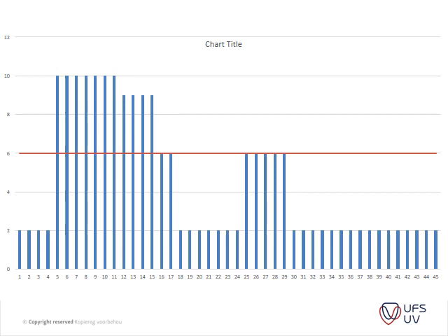Okay, now the example continues to indicate the maximum amount. So the problem is that the contractor only has 6 joiners available to work on this project. If the project completion date is not to be extended, the only solution to the problem is to level the labor demand within the program according to the number of joiners available. This means adjusting the work activities within the available float, but obviously not the critical ones, to reduce the peak labor demand. This is shown in figure 18.3.